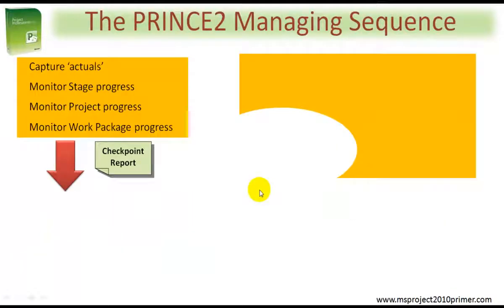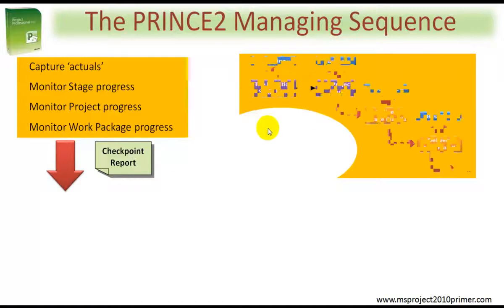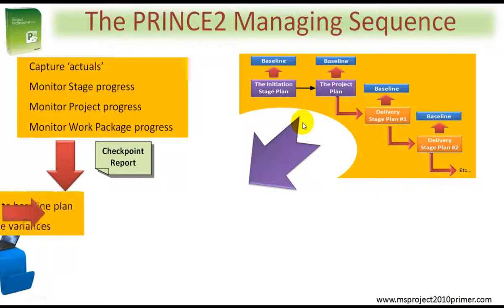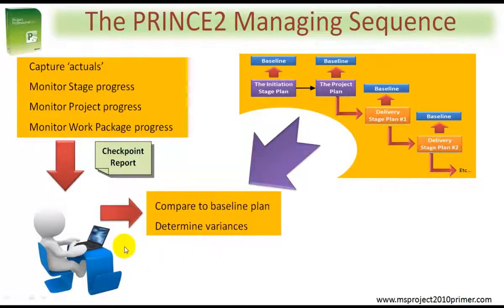Taking a quick look at the managing sequence, the project manager, once the plan has been approved, is there to catch what has actually occurred — at stage level, at project level, and within each stage at the work package level. The checkpoint report is a valuable input here when using the PRINCE2 method. The project manager's challenge is to compare actual information against the baseline plan so that he or she can determine the variances.